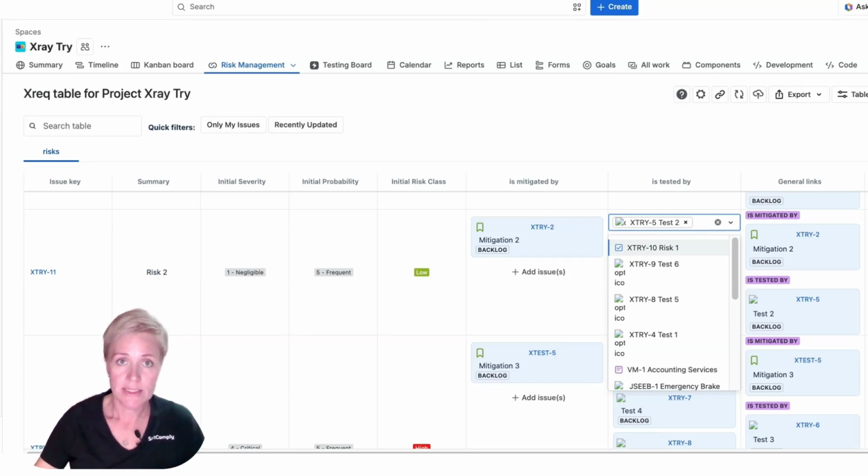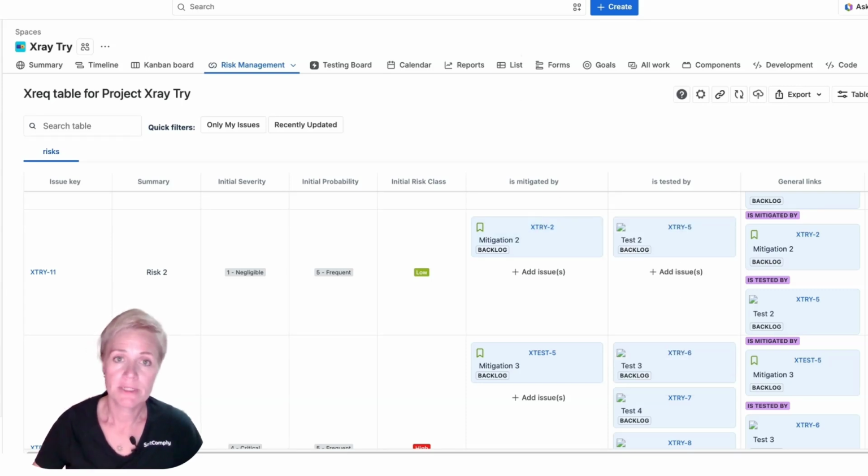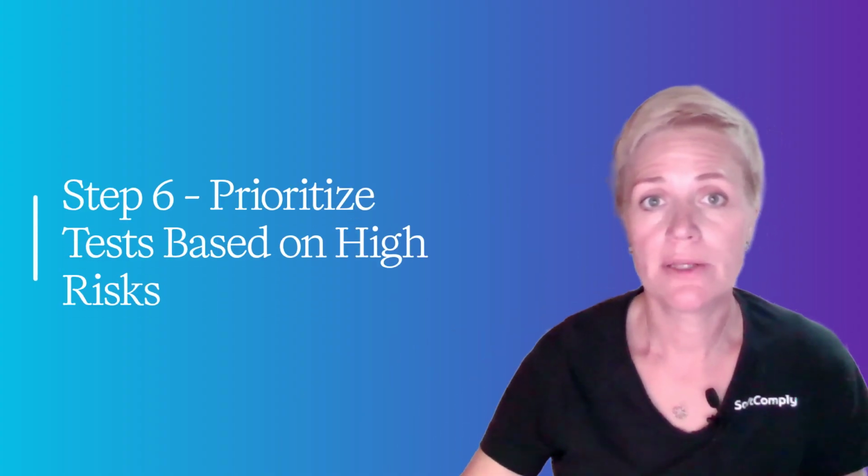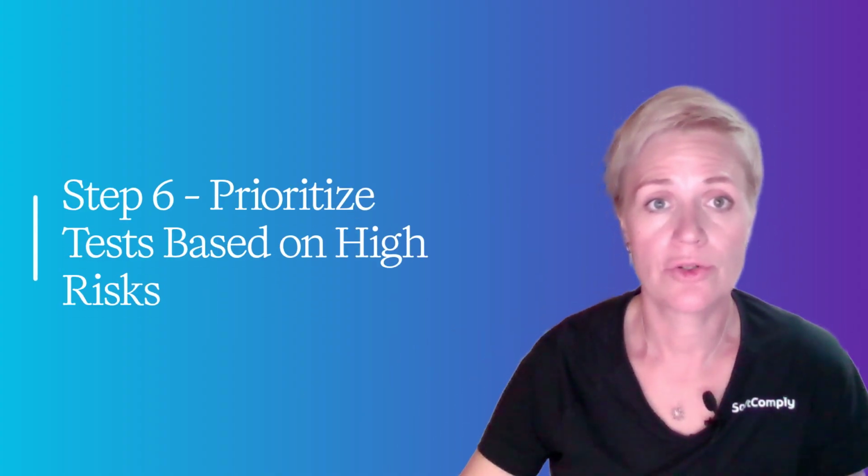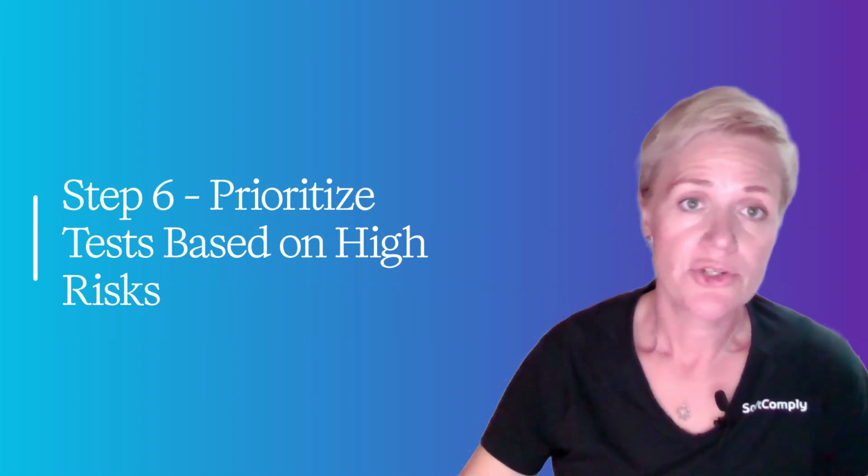When creating the test, it is linked directly to the mitigation action using the standard Jira relationship "tests" or "is tested by". Because the mitigation is already connected to the original risk, Xray automatically becomes part of the complete traceability chain. The result is a continuous path from risk to mitigation to test, and then from test case to test results.